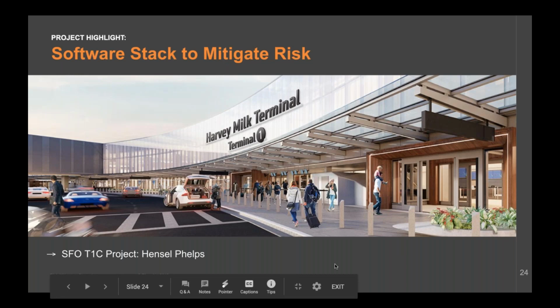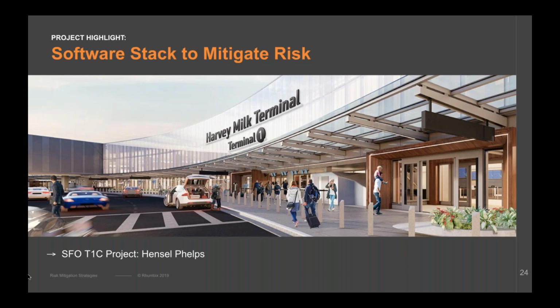Through Rhumbix, we're using them for both our labor and production tracking and our timekeeping. For any additional work that we have to do to advance the schedule, while we're negotiating and reviewing the design with the stakeholders, we're able to provide very deep and accurate visibility into any change condition. Furthermore, Rhumbix is also enabling our team doing production work to better monitor all of our actual cost codes, which enables the project team to make timely and accurate real-world decisions.